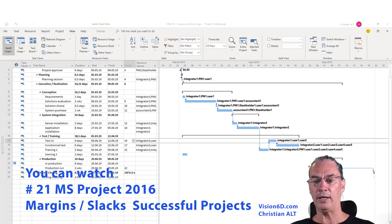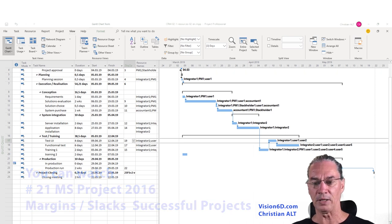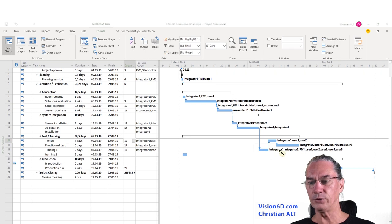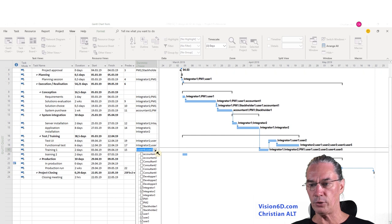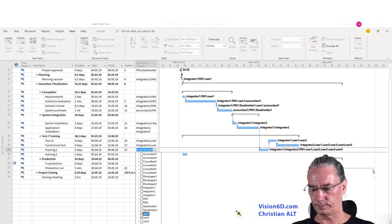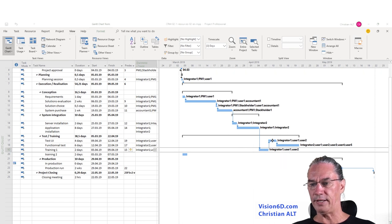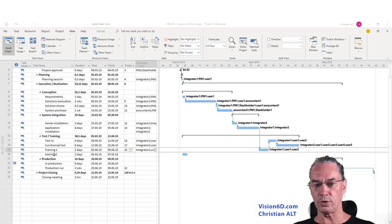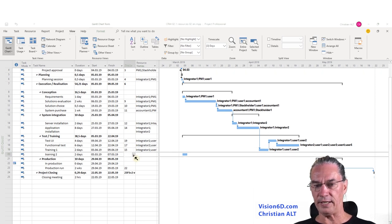In the space I'm showing, there isn't anything — this is what we call a margin, and when defining a project it's really important to have margins. Now we have a training, and after that we can start the test of the user interface. In that first training I don't need all the people — just the ones needed for the user interface test, which is integrator 1 and users 1 and 2. Then the people can do the work, and once the first training session is done, the second one can occur.